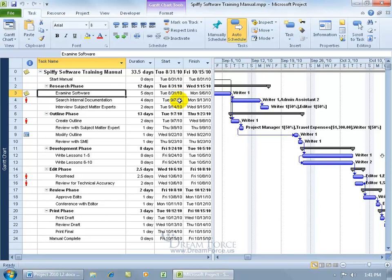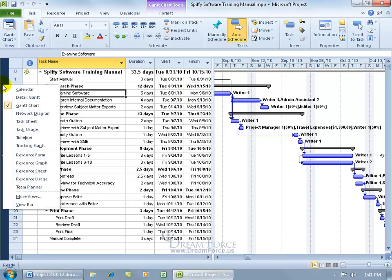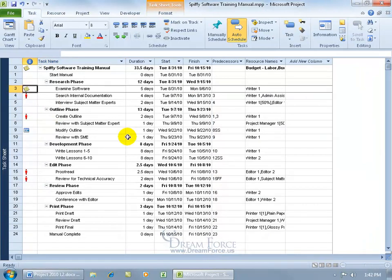In that view, you'll have the same fields up here, as you see here, but with a three-letter prefix of ACT for actual duration, actual start, actual finish, and so on. And the purpose of keeping our defaults, as you see here, from the actuals is so we can compare between the two, and that can be very telling in our project here, and as a lesson also for future projects of what to do or not to do. Like, maybe we don't want to use Writer1 because he typically starts his tasks late. Now, there's a couple ways to entering in your actuals, and we can do it by switching views. So I'm going to come up here and right-click on the view bar and going to the task sheet view.